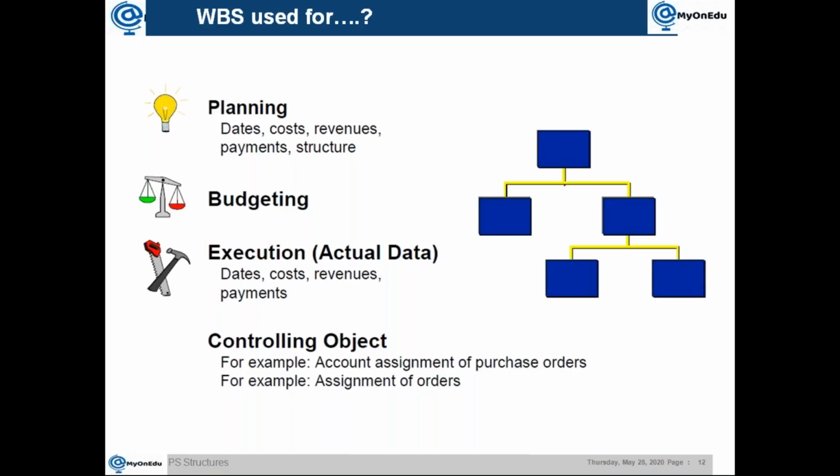Then you can use it for budgeting. Budgeting is also a kind of plan, but one which has a binding. It means it won't allow you to spend more than that. That is also possible. Then you can use the WBS element for execution. It means you can post your actuals.